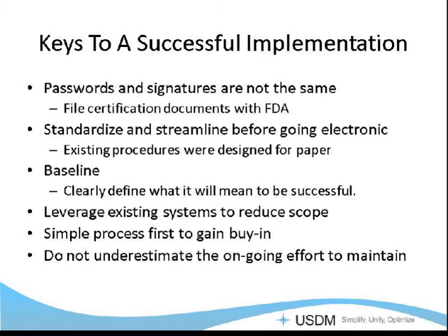All these things really add up to a lot of time and effort. And if you capture this up front, you can have a very clear understanding of where you really want to focus your efforts. For instance, in the one area where we had 100% of our laboratory notebooks returned for corrections, that is something we wanted to target.